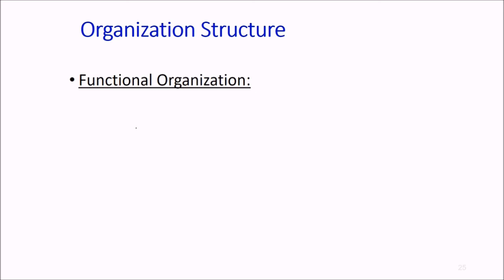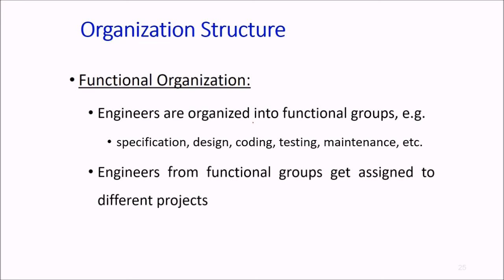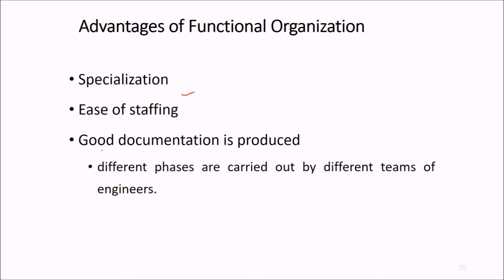Then we come to organization structure. First is functional organization. Engineers are organized into various functional groups depending upon the function they perform. For example, one group performs specification, another does design, third is coding, then testing, and there's a team for maintenance. Engineers from functional groups get assigned to different projects, not only one project. Advantages of functional organization: first, specialization. A testing person will do testing only. Ease of staffing - knowing where and when to put whom. We can easily produce good documentation because different phases are carried out by different teams, and errors can be identified quite early.